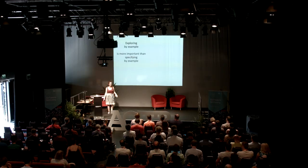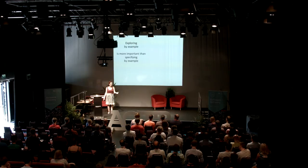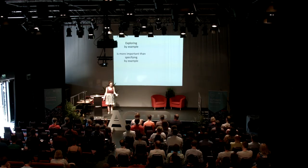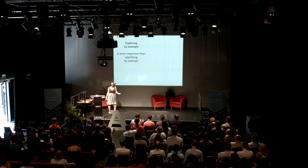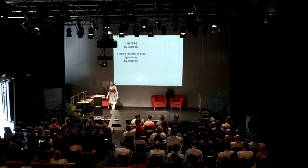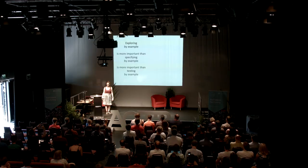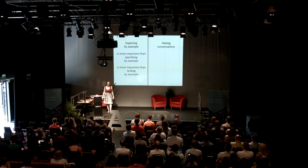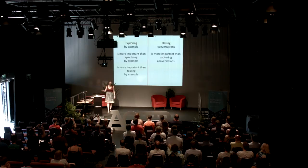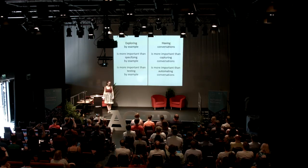Exploring by example is more important than specifying by example — capturing the ones you're going to keep and writing them down. Try it out. Devs, your power is here — you can explore in code. We call that a spike or a prototype. Get one scenario up and working. Hard-coded user, they're already logged in — get that running, get some feedback on it. It's more important than specifying by example, and that's more important than testing by example. Having conversations is more important than capturing the conversations, which is more important than automating them.